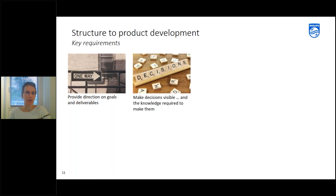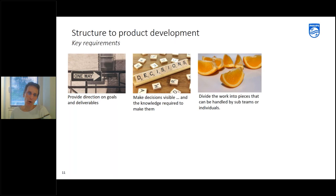So it could be a request to change, so then let's think about what is then the knowledge that we require to decide whether we will allow for that change or not. It could also be a choice between technologies or other things in the front end. Then the third one is an open door, I think. It's divide the work into pieces that can be handled. So we always try to make smaller pieces of work, rapid learning cycles. In that technique you look into what are the knowledge gaps and you give the knowledge gap to a certain sub-team or to a certain individual to fail and to find the knowledge or to do the experiment to create that knowledge. It could also be when it's more an implementation project or something else that you make logical sub-projects so that sub-teams or individuals can work on that.